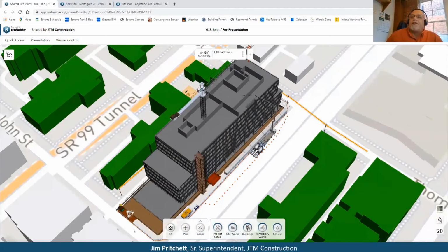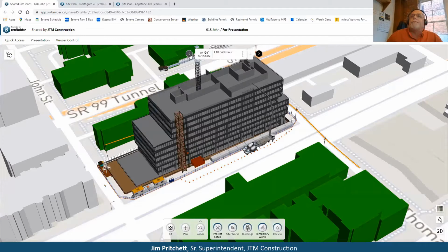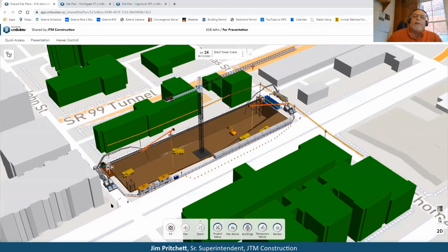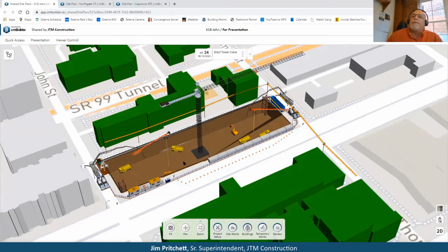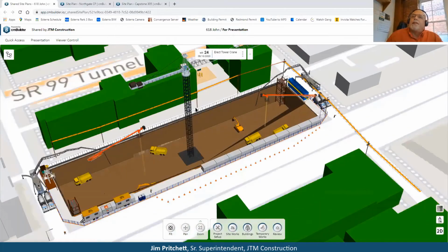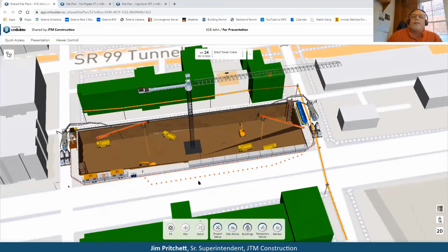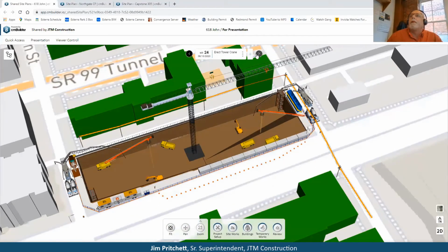to our mass excavation. Whoops, jumped ahead too much. Our mass excavation, where placement of our ramp, where we plan on pouring the foundation, staying off of 7th, and then placement of our crane, placement booms, and just general equipment. Also, we have our banker take set up, as well as our egress stair towers.